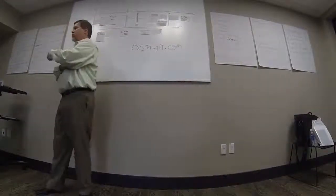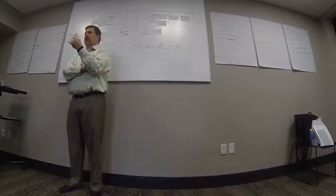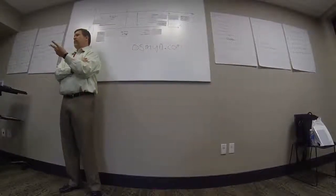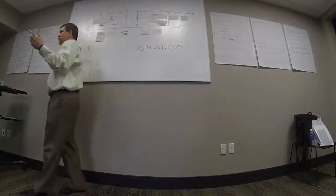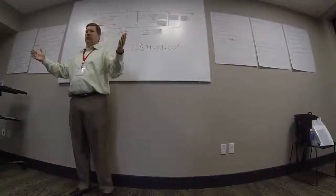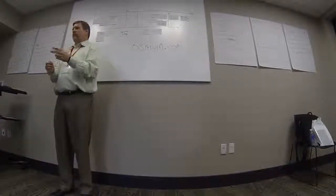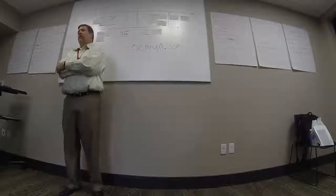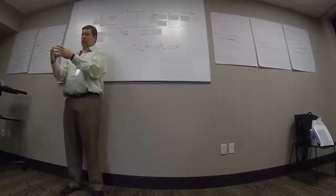So what we did when we started this process at Five Nines is I got these guys together, and we worked on an iteration of stories, and we guessed at what point values would be, and then we said, alright, so look, let's pick two stories at our baseline, one that's two points and one that's five points. The story points use the Fibonacci sequence. Is everybody familiar with that? Okay. I don't need to go over it. One, two, three, five, eight, 13. The whole point is that as you count up, the distance between the point values gets larger, and it's really to make you decide whether it's this or this, because the difference between one and two, the difference between five and seven. One and two, maybe. The difference between five and six, the difference between 20 and 21, you want these dramatic differences. So what we do then is we say we know that this story is our, we're going to say that's our two-point story, and that this story, it's a little bit bigger, that's our five-point story.